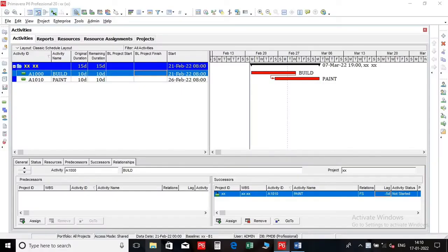When the first activity is still running and the second activity starts, this is called lead. It means overlap between the first and second activity. PMI treats leads like lags. You should be careful not to use large leads and use activities instead of them where possible. DCMA is much tougher in this area and completely forbids the use of leads. The reason is that leads are usually misused and hard to manage.